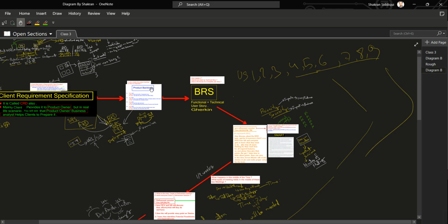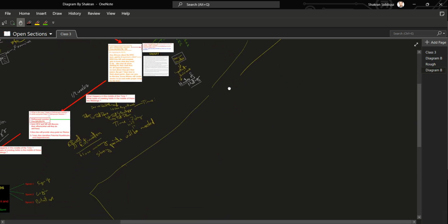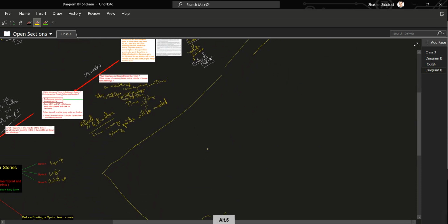The SRS, you know, the SRS FRD, these things are created, but the user stories are being created one by one. So as they are being created, the developers instantly start working on it, and then the other user stories follow along. So this is how the parallel method that I've taught you guys about is known as agile methodology. Name is agile and it is a methodology.